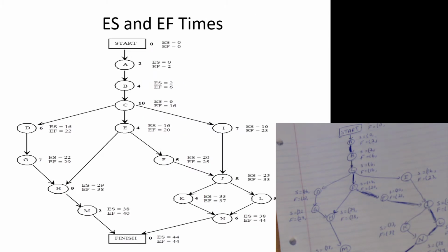You get the whole diagram, which is where we're at right now. The interesting parts are where an activity such as J has 2 or more immediate predecessors. J cannot begin until the later finish of the immediate predecessors.